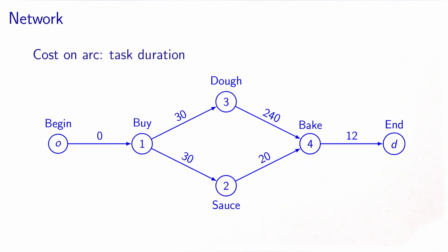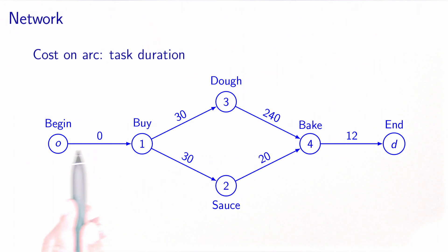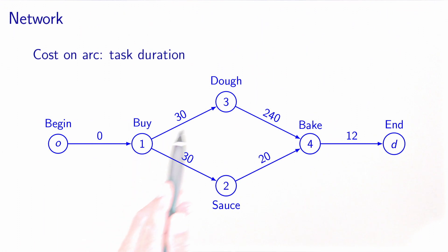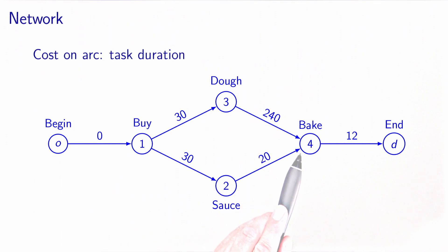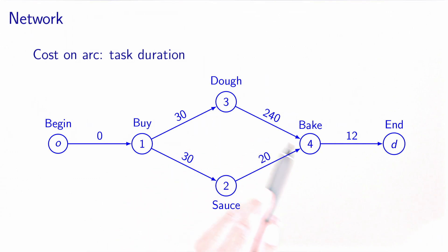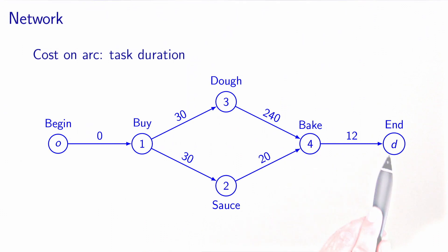Now we need to add a cost on each arc. The idea is to assign each arc the duration of the task represented by its upstream node. The origin node is not a real task, so its duration is zero. Buying the ingredients takes 30 minutes, so we put 30 on each arc leaving that node. Preparing the sauce takes 20 minutes, so we put 20 on its arc. Preparing the dough takes 4 hours, so we put 240 on its arc. And baking the pizza takes 12 minutes, so we put 12 on its arc.